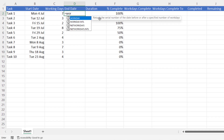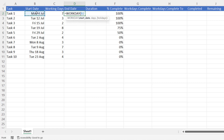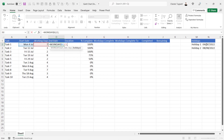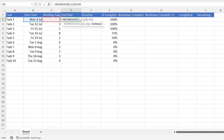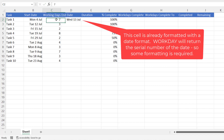To work out the end date we can use the WORKDAY function, which returns the serial number of a date before or after a specified number of work days. So my start date is in B2, working days is in C2, and my holidays are in N2 to N3 — I need to lock that with the F4 key. Press Enter. If this value was one day, you'd see that a one-day task starts on Monday the 4th of July.